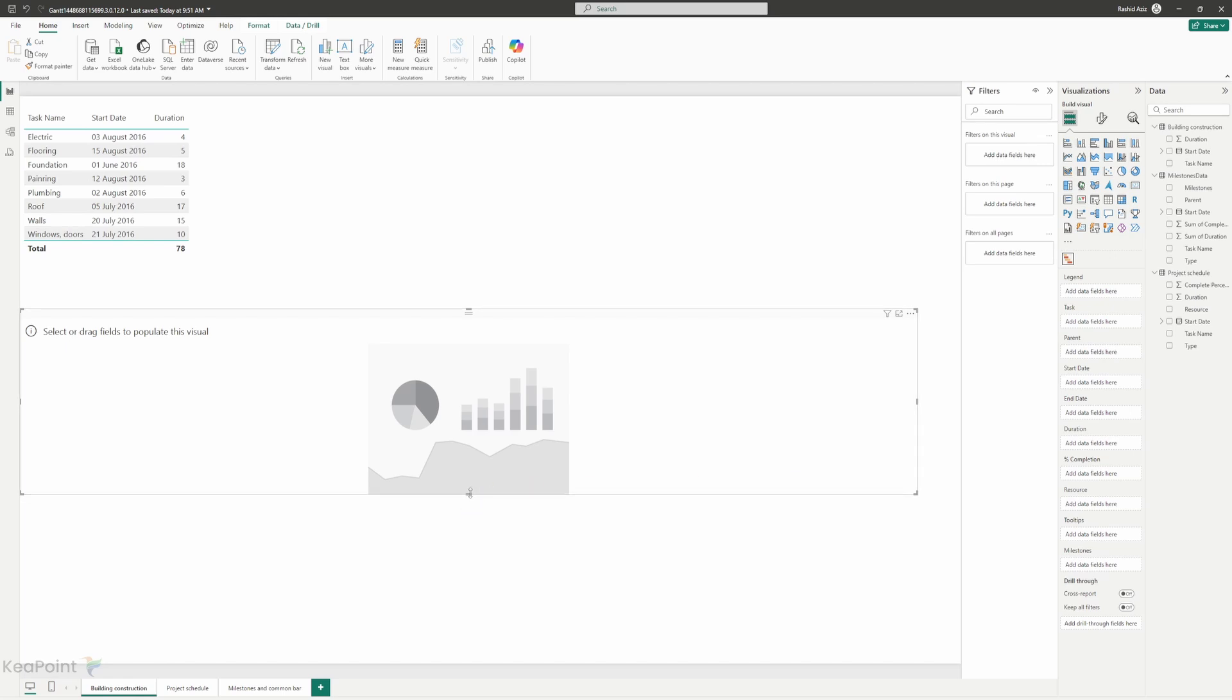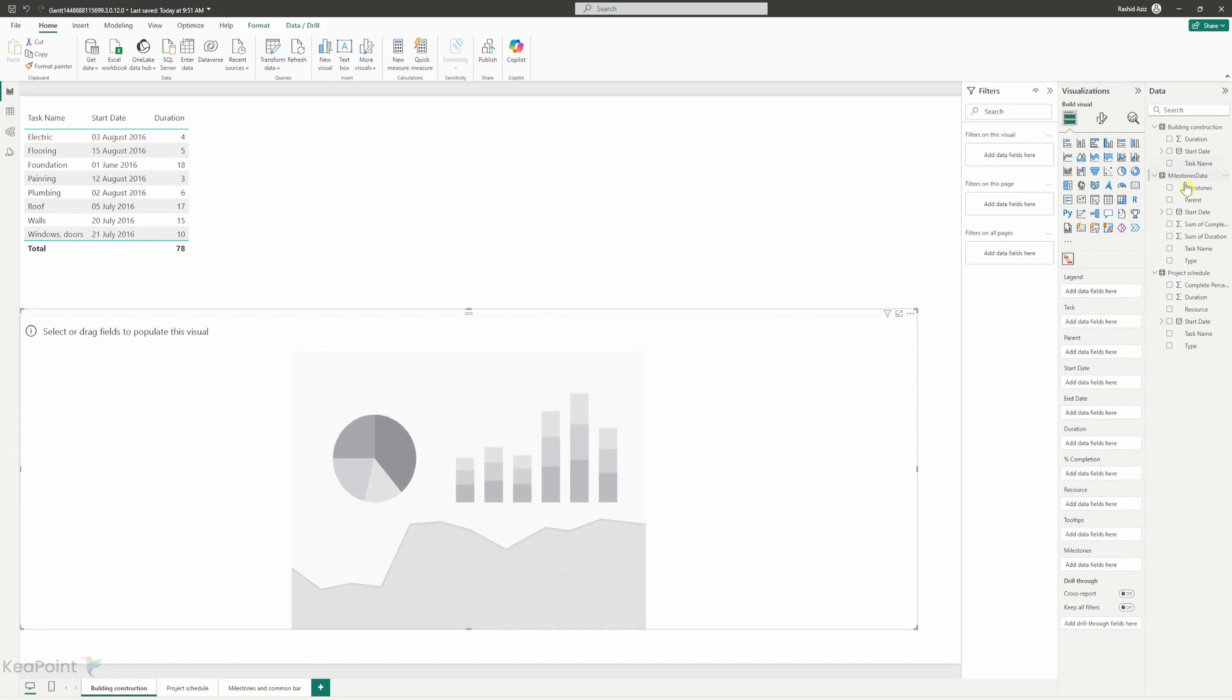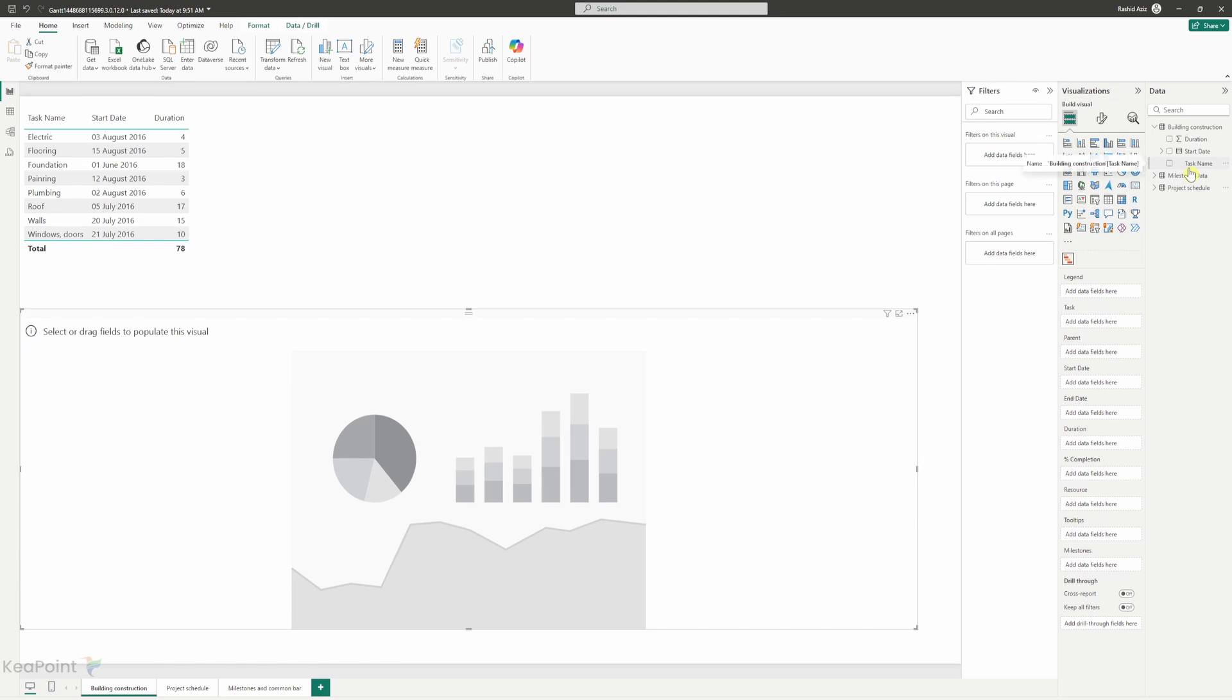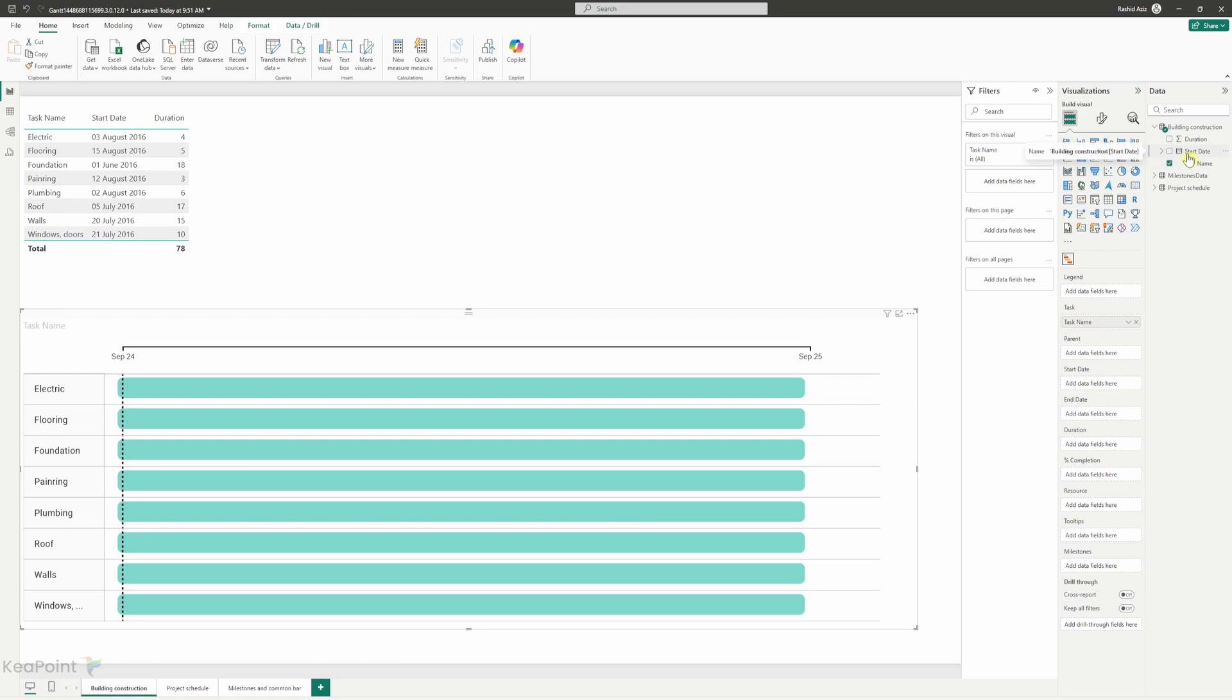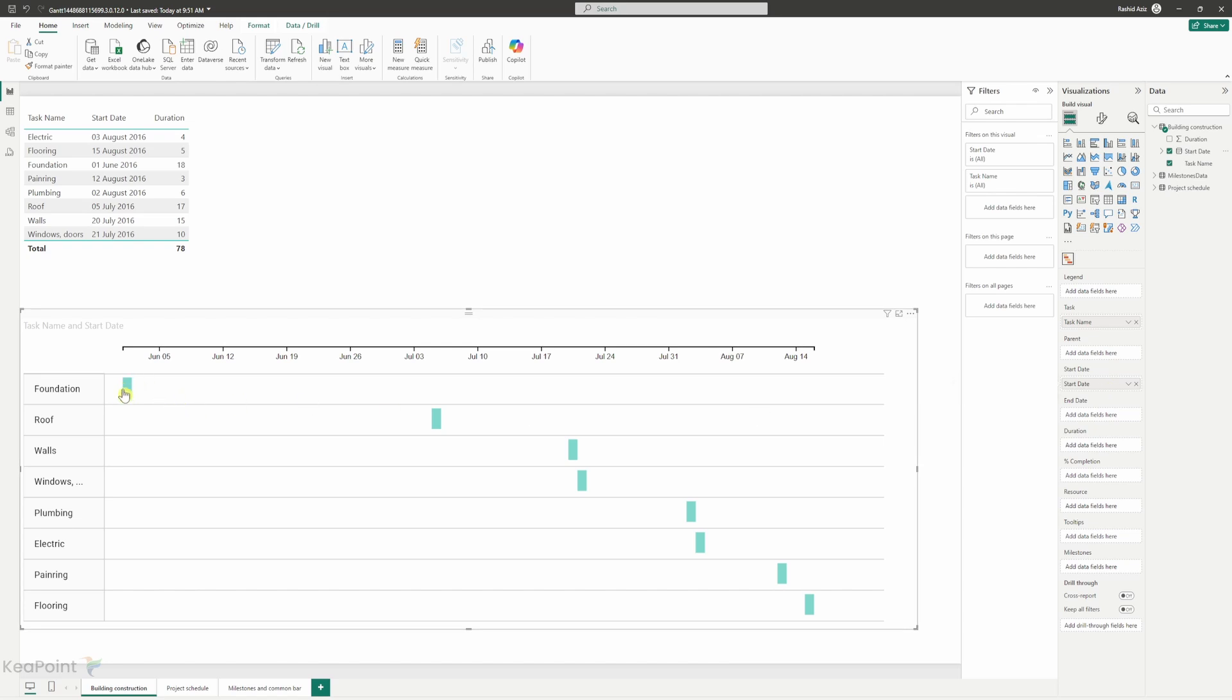I will make it a little bit bigger. For the building construction we will focus on just the building construction table. So we have three columns here: task name, start date and duration. We will map the task name to this task column. So now we can see all the tasks are listed here and then if I drag this start date and map it to the start date column. Now you can see that the task and the start date for each of the tasks in the Gantt chart view.